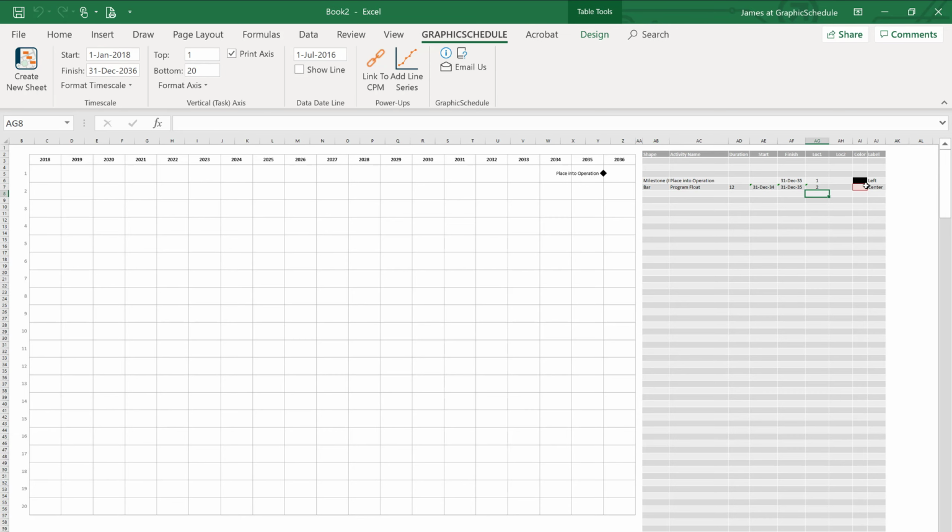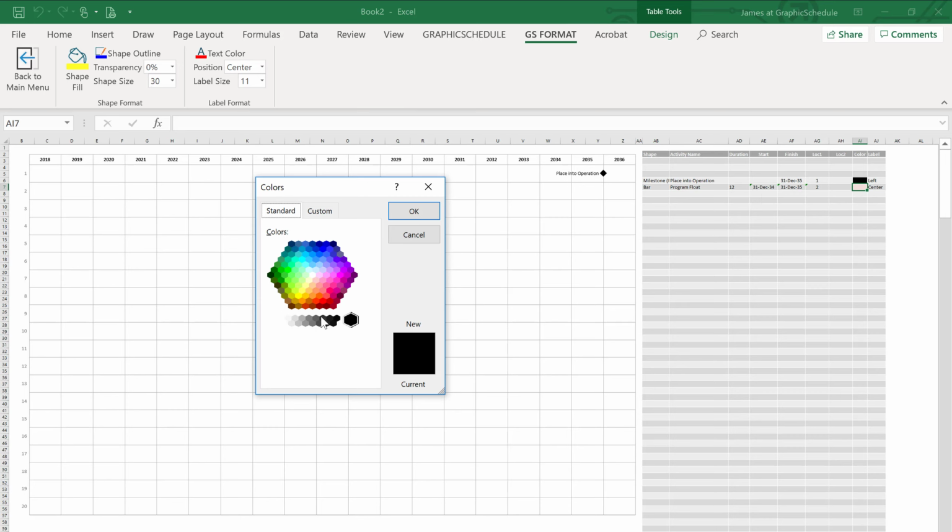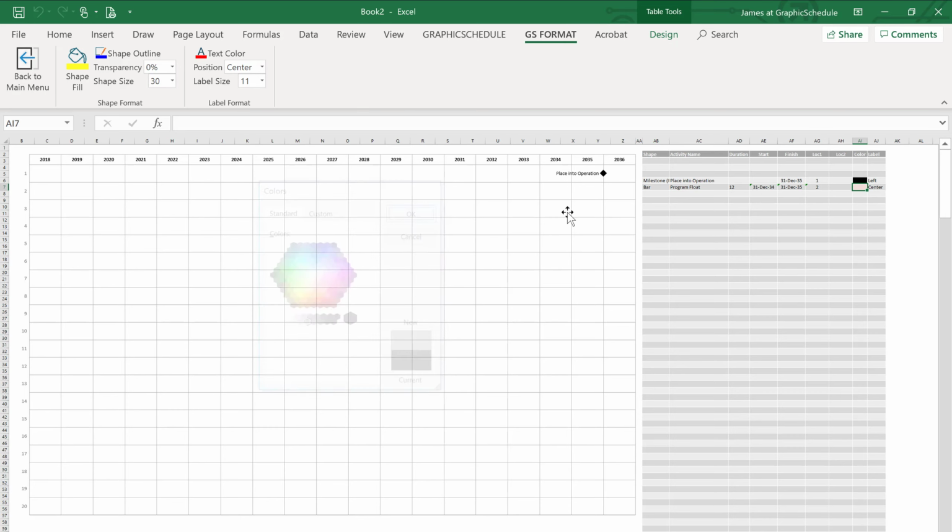By inserting float in a working backwards schedule, you're helping the entire organization plan to finish the job 1 year ahead of the public deadline. This will pay off later if delays or changes occur. And if the team executes flawlessly from start to finish, you can open a year early and exceed everyone's expectations.